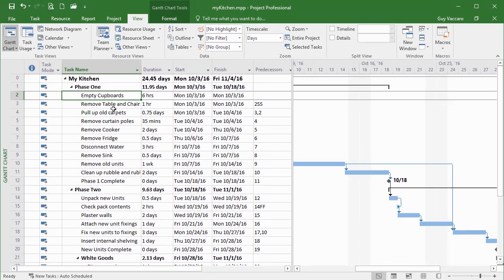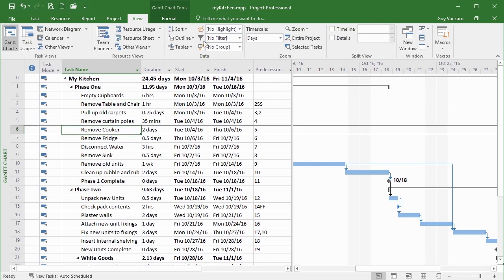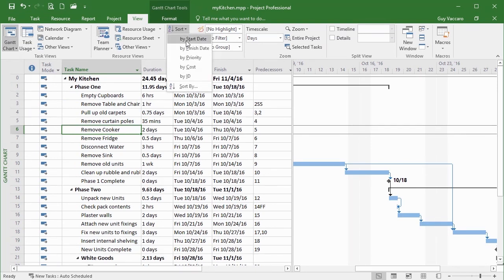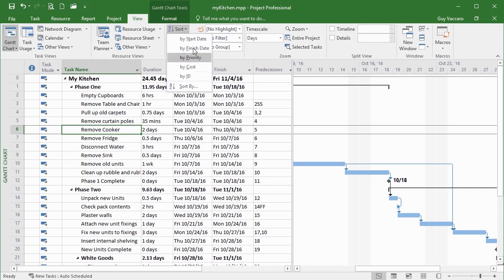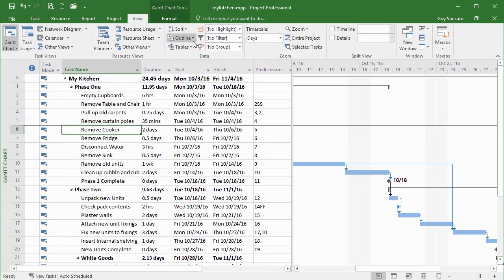We can do that using the Sort option. Click anywhere — it doesn't matter if we're at the top, bottom, or middle — come up to Sort. It has a drop-down arrow and we can choose to sort by some predefined fields: start date, finish date, priority, cost, or ID. They're already sorted by ID, which is really our quick way of getting them back into ID order. If we go with start date, there might not be any movement because our tasks are already in chronological start date order.